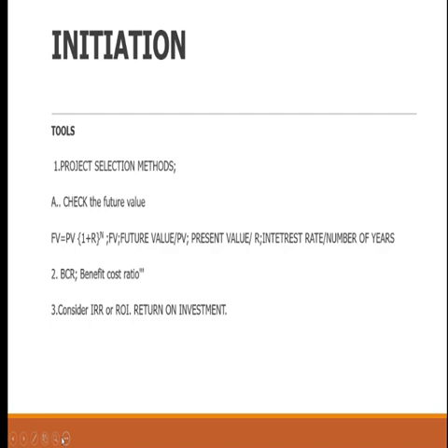I'll give you 3 ways to make a fact-based selection when you are faced with multiple options. Number 1, the first thing to do is look at the future value. The future value of every project is critical to the present decision whether to start or not to start. So future value is equal to present value multiplied by the rate raised to the power of the number of years. I'll take it again.